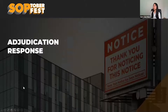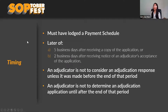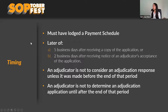Now swapping hats to the adjudication response. Under section 20 of the Act, you must provide an adjudication response by the later of: five business days after receiving a copy of the application, or two business days after receiving notice of the adjudicator's acceptance. Importantly, under section 20(2A), you're only entitled to provide an adjudication response if you've lodged a payment schedule in time.